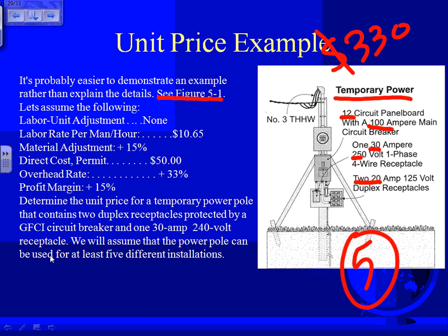Can I divide the installation time by 5? No, because every time you have to install it, you have to put the time, right? So they added it. You end up with 6.5 hours. Multiply by 10, $69 to set that baby. Not bad, huh? Then they took the material, divided by 5, and then they added the installation material, which changed from time to time. They came up with $84.